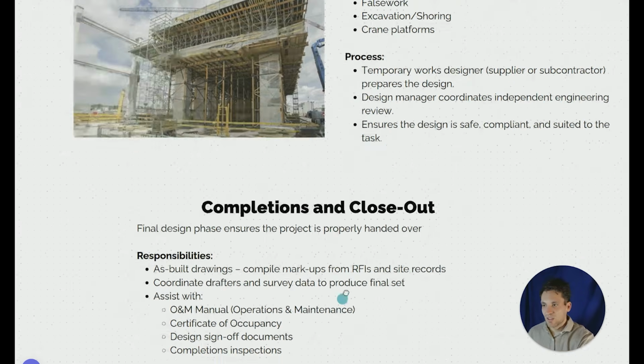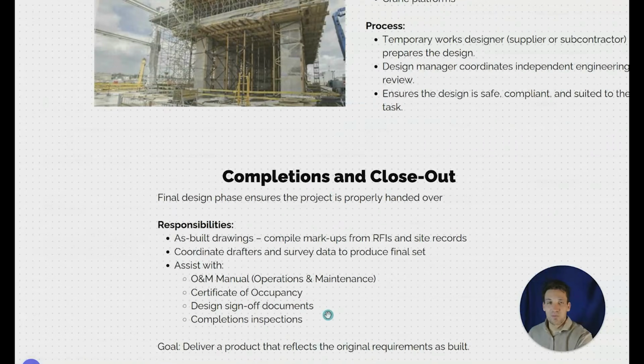They'll also assist with things like the preparations of the operations and maintenance manual, the certificate of occupancy. They might do some sort of owner training, or any completions inspections. The design manager usually plays a huge role in this process, and the goal is to show the owner that we've built something that complies with the original requirements and to help them facilitate their transition from the construction phase to the operations and maintenance phase.